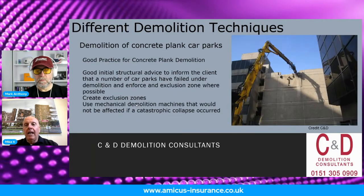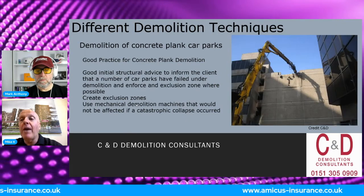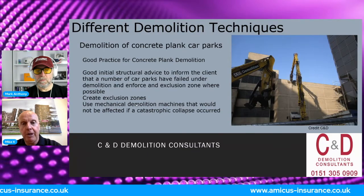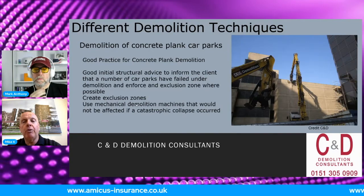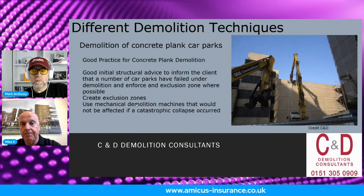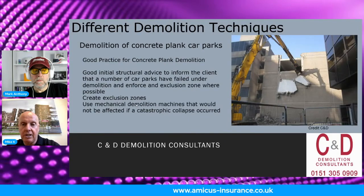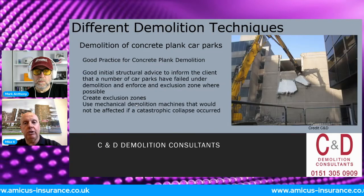So let's have a look at some good practice going forward. What can we do to ensure that when we take down a car park, we don't have a failure? We don't want any of our fellow demolition people around the world to be injured. Enough people have been injured and hurt over the last few years. It's something we desperately want to avoid. So what can we put in place? Well, my advice is to seek structural engineers before we even start. Maybe that's the client or the demolition contractor. On this project, 2 separate structural engineers were employed, and they gave good advice to bring it down. So for me, get good structural advice.